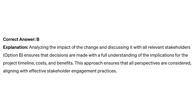Correct answer: B. Analyzing the impact of the change and discussing it with all relevant stakeholders ensures that decisions are made with a full understanding of the implications for the project timeline, costs, and benefits. This approach ensures that all perspectives are considered, aligning with effective stakeholder engagement practices.